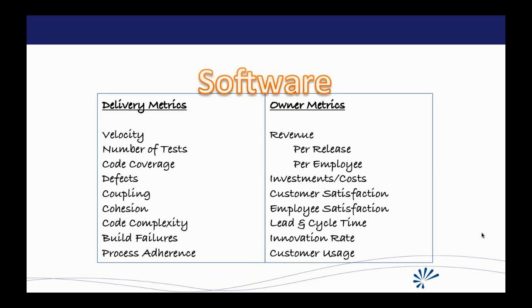Customer satisfaction and employee satisfaction are on this side. Lead time and cycle time are kind of related, but basically lead time is from the time the customer asks for something, how long does it take us to get it to them? There's a slight difference with cycle time. It's when we start working on it, how long does it take to get it ready for production? So you'd like them to be the same, but they rarely are.